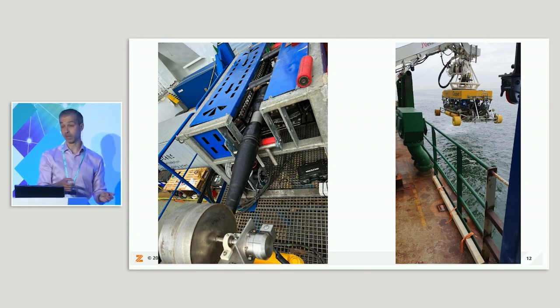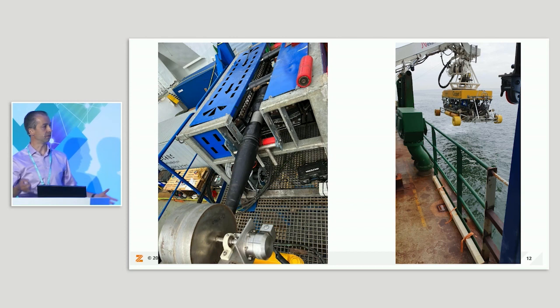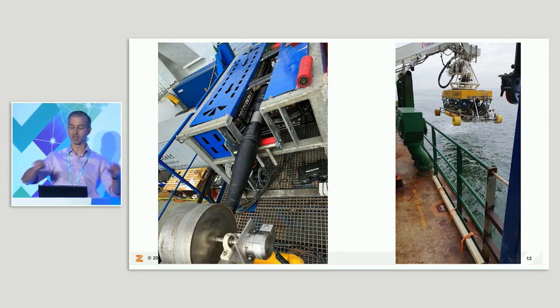Now, I didn't actually realise, and again this was explained to me during my research, that the sea cable is not laid completely from end to end. They stop around 5 or 10 kilometres out to sea with the wet cable. And then there's a separate specialist team, a shoring vessel, that comes out and connects the cable and brings it up onto the land at one end, and the same at the other end. They're very different, very specialist teams. So this was done out on the wet portion as well.